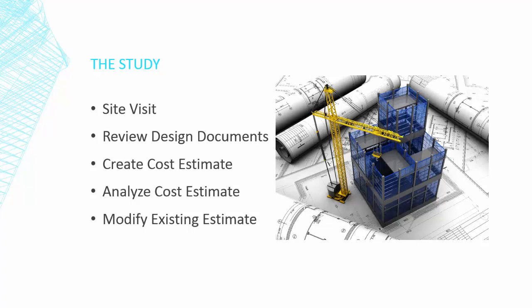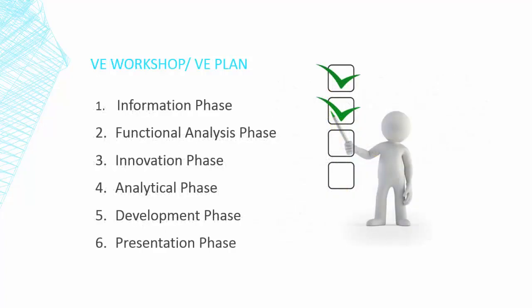Once we've done our pre-workshop, we can start the actual workshop. The actual workshop consists of six phases: your information phase, functional analysis phase, your innovation phase, analytical phase, development phase, and your presentation phase.